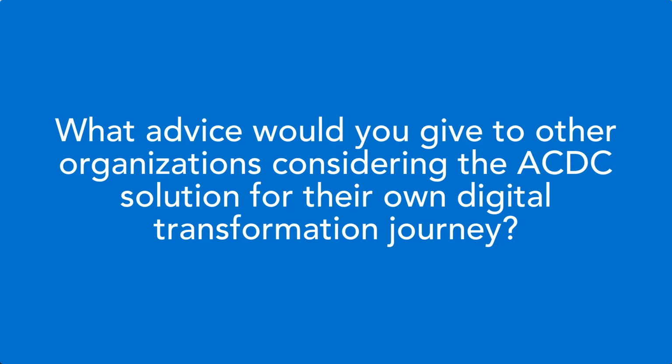So when it comes to advice for another organisation considering the ACDC solution and also our learnings, firstly, I would consider the planning of the project and ensure that it's going to be adequately resourced to implement the project properly. It's a considerable digital transformation project. It's a change of process. It's not just a software installation. So don't underestimate the investment required to effectively implement the ACDC solution and have it fully integrated. Also consider the cost of this initial implementation in terms of resourcing hours and the ongoing licensing fees.